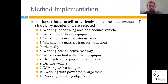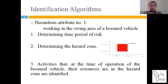To demonstrate the method's capability, we implemented it on the excavation and stabilization of a real project. A struck-by accident, one of the four most frequent accidents in the construction industry, was selected as a sample category. Eleven hazardous attributes were selected from the literature to create the construction hazard database of this study. Here are the 11 selected hazardous attributes. I can't describe each of them due to time restrictions, but the algorithm for hazardous attribute number one — working in the swing area of a boomed vehicle — is described briefly as a sample.